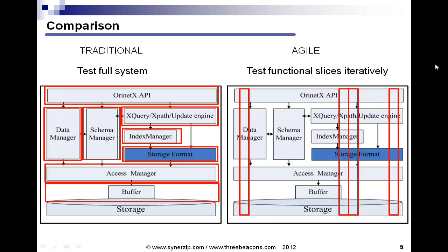It takes that pain of the big integration approach and spreads it out throughout the entire project. For example, you'll see the vertical slices I'm showing here, which represent end-to-end functional slices. These are typically user stories, or you can think of them as features. In Scrum, it's called sashimi. And this includes full end-to-end functional slices from the user interface to the business logic, to the middleware, to the database, and all the way back up the chain.